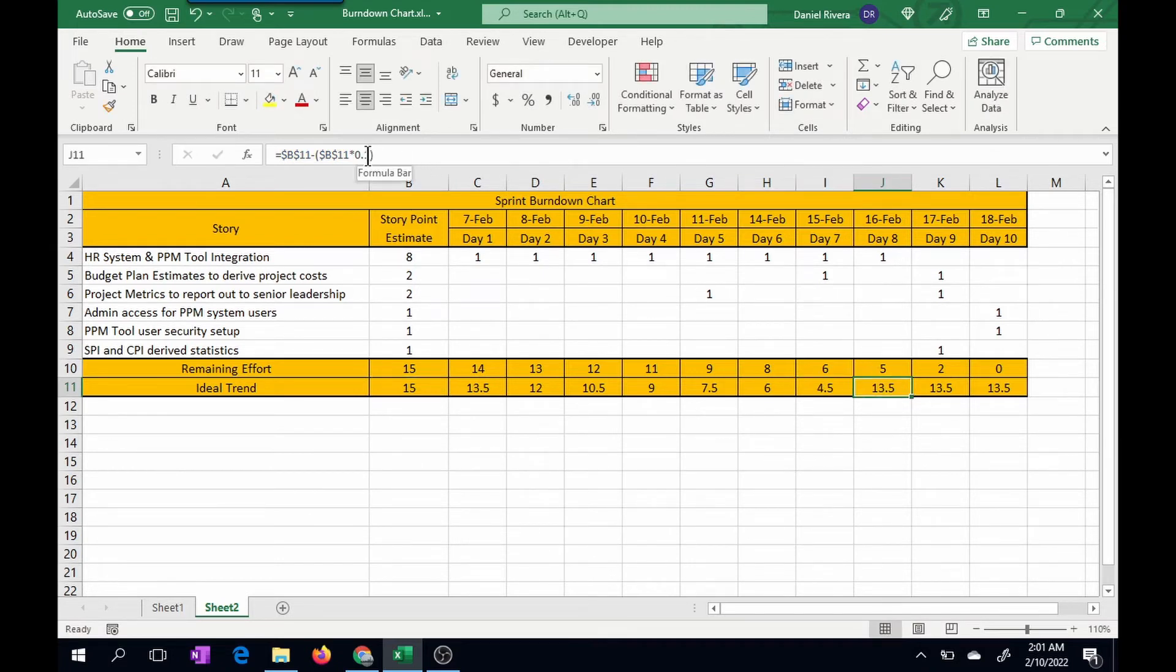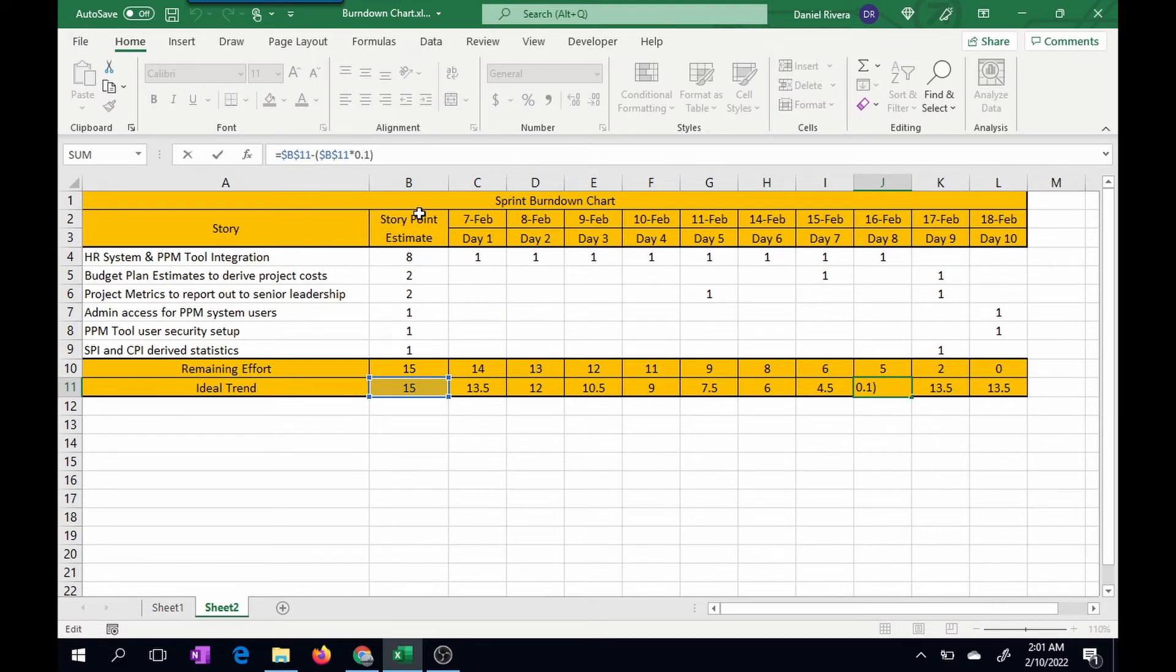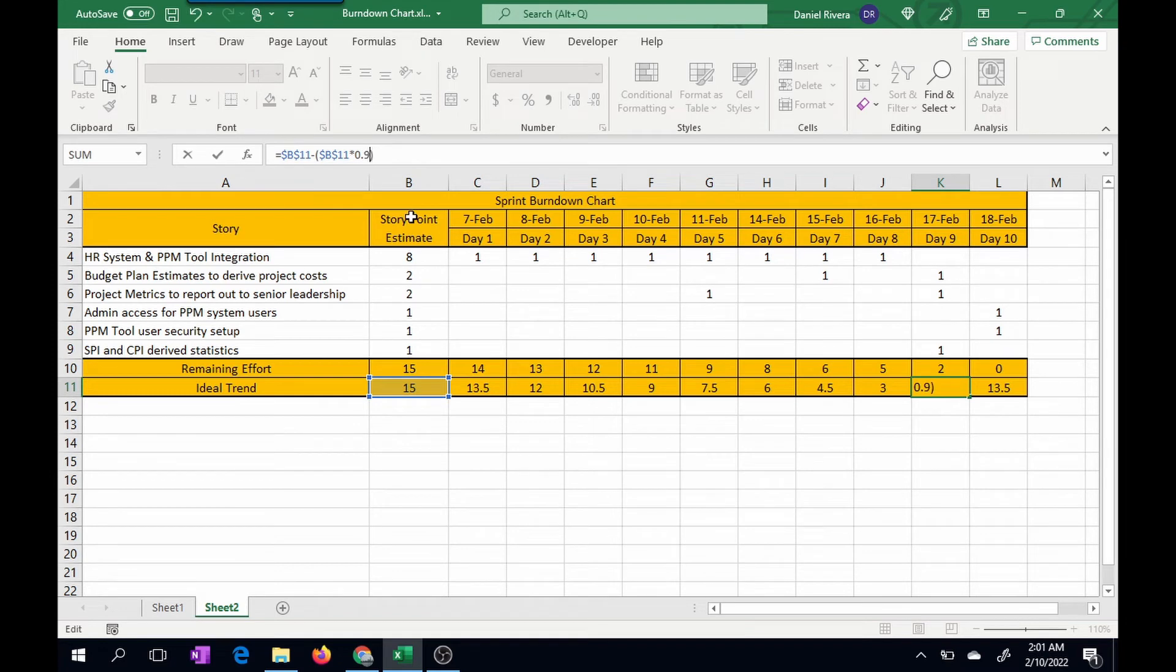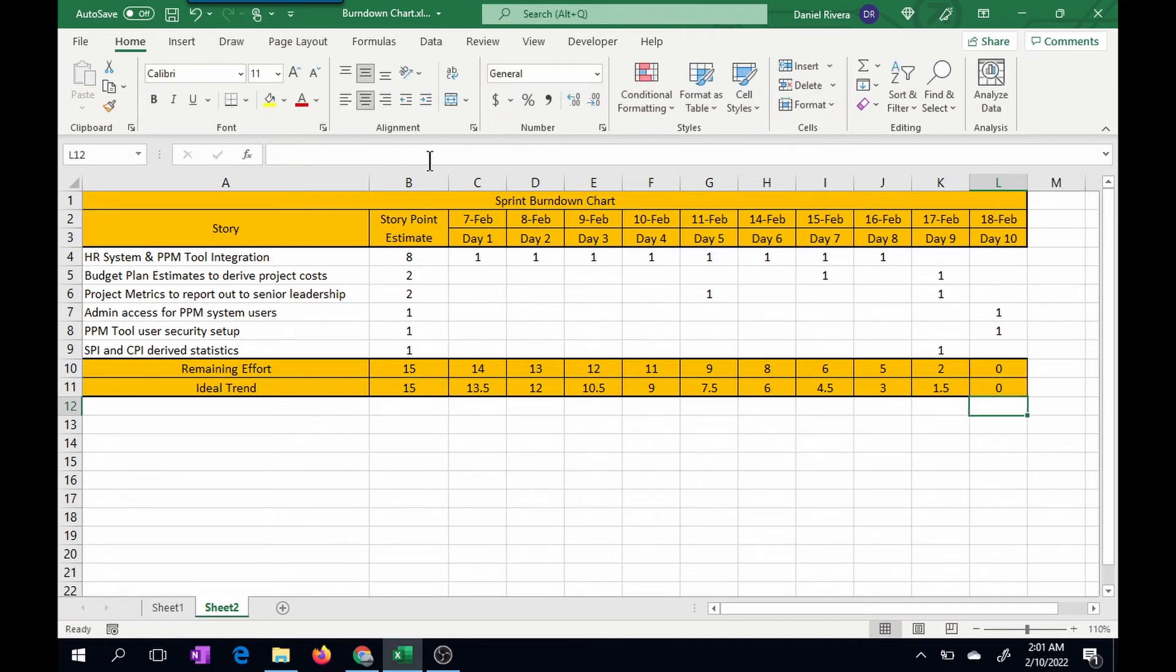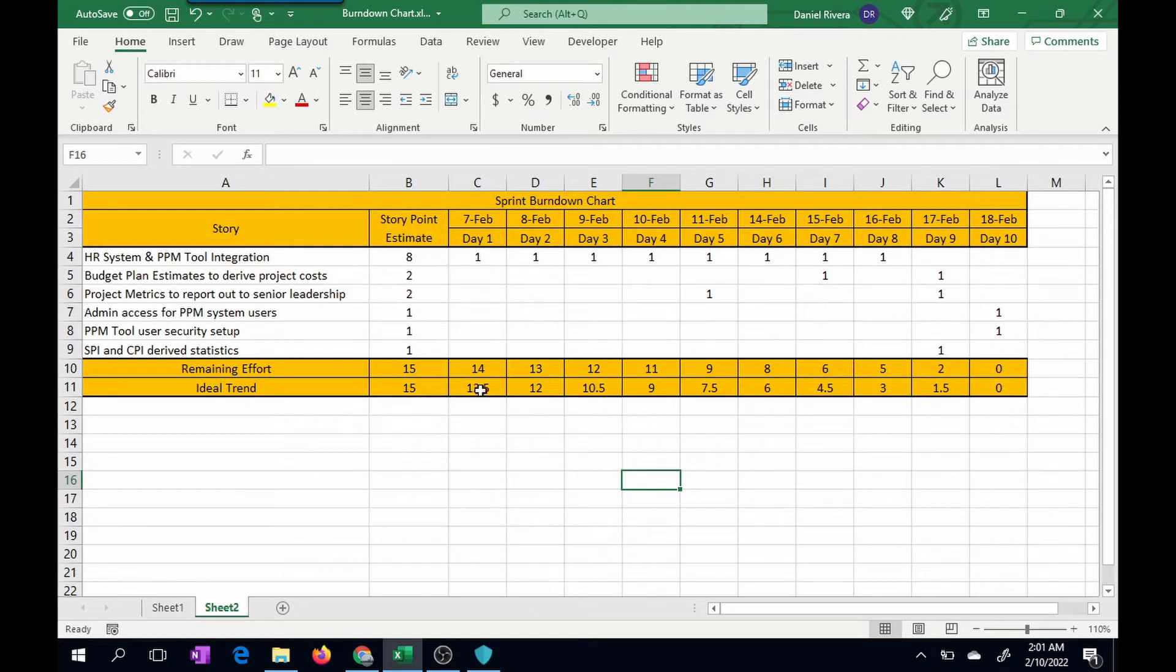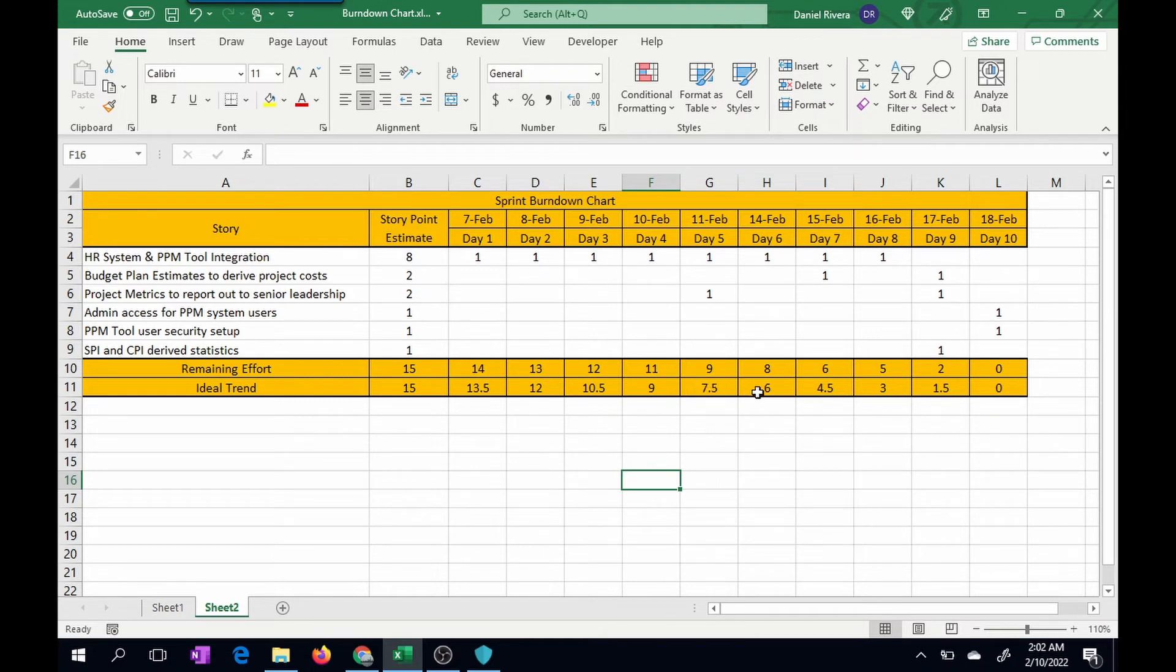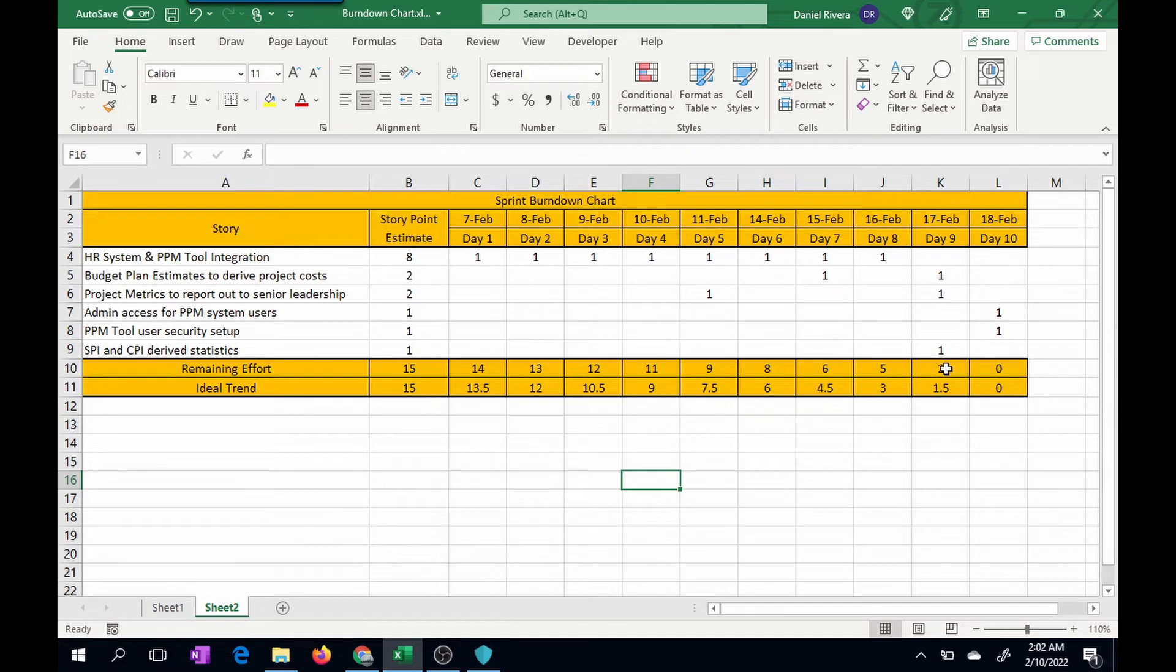And then finally, this would be 1. So right now, you see the trend line running from 15, trending down to 0. You can see here, trend 12, we're kind of behind schedule based on these numbers. But the good thing is we're not falling too far behind. We're close to the trend line until we get here. We're basically caught up with the trend line based on our sprint execution, and ultimately, we do catch up and finish on time.